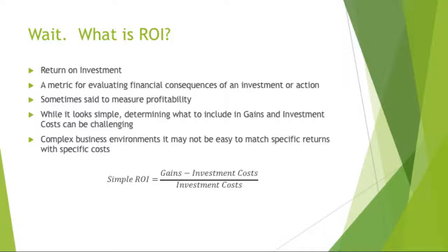Gains are generally in the form of savings to the organization. Cost reductions can be direct savings, which include things like elimination of legacy systems, reduction in contractual support, disposal of old facilities, or a variety of other cost reductions and benefits. They may also be indirect savings, which are harder to quantify. Examples of these include increased employee proficiency or reduction of development time.